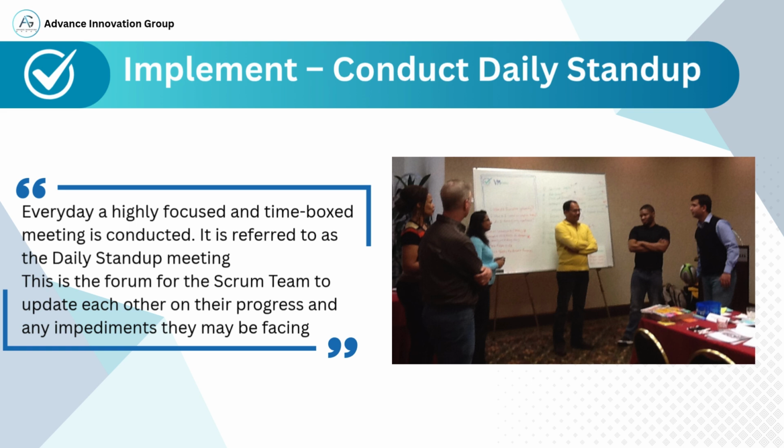The Scrum Master may facilitate the daily stand-up, especially in the beginning, but the responsibility lies with the development team. If any issue is raised that requires further discussion, it should be handled after the stand-up in a separate meeting. By making this a daily habit, teams become more agile, quickly adaptive, and stay focused on the sprint goal.